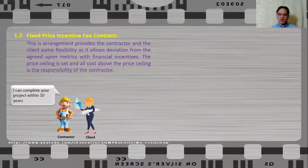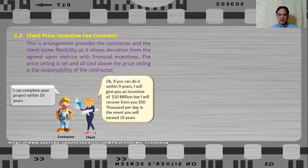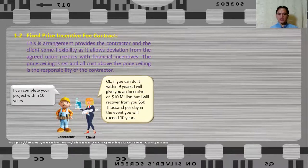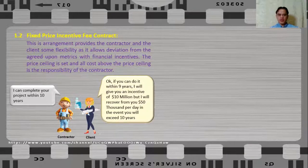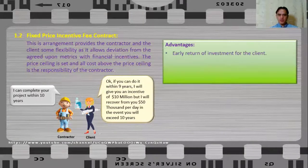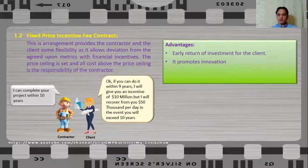For example, the contractor can complete the project in 10 years — that is the agreed duration. But the client says: if you can do it in 9 years, I will give you an incentive of $10 million, but I will also recover $50,000 per day in the event you exceed 10 years. So the incentive may come in the form of positive and negative incentive — it is like a carrot and stick. The contractor will use all available innovation and technological advancement to achieve the metrics and receive the incentive.